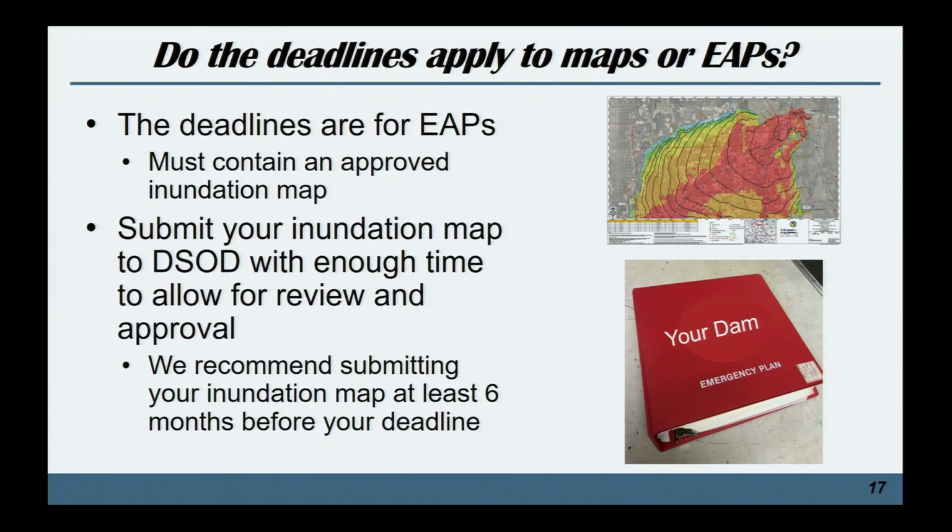Another question we're hearing is, do the deadlines apply to maps or EAPs? And the deadline, the way that the statute was written by the legislature, the deadline is for EAPs to be submitted and must include an approved map.